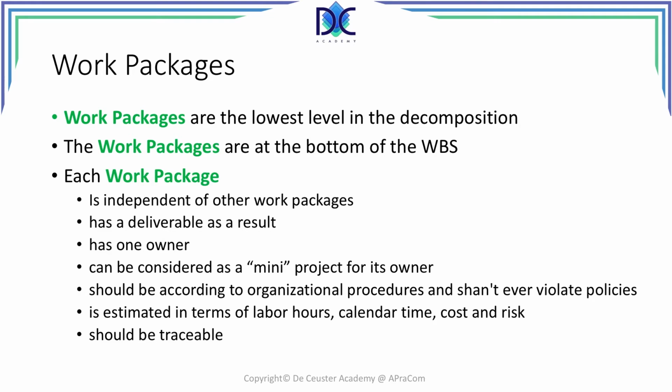Work packages can also be considered as a mini project for its owner. So making those windows is not just putting the windows into the building, but it also means that they have to measure the windows, they have to construct the windows, they have to put the window frame in the building, and then they have to put the windows themselves there and seal off all the construction.